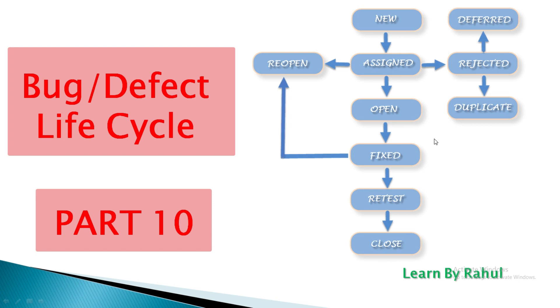Next is REJECTED. If the developer feels the defect is not a genuine defect, then it changes to REJECTED. The third is DUPLICATE. If the defect is repeated twice or corresponds to the same concept, the status is changed to DUPLICATE.